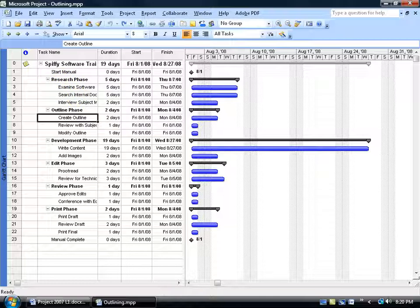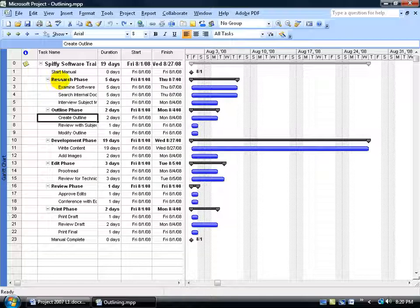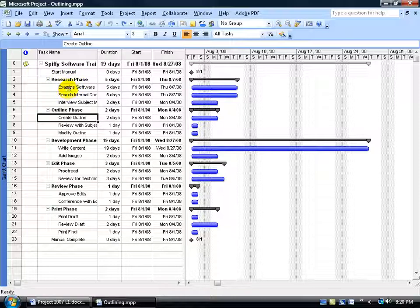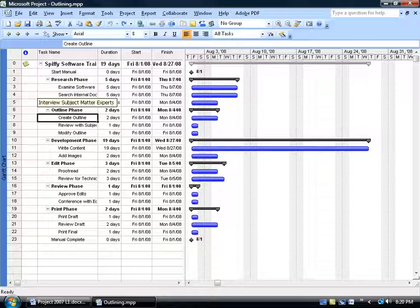But if I apply the WBS, which will be great in reports, what that will do is it'll take a number, like it'll assign the summary task, let's say the number 2, and then a subtask, instead of going sequentially 3, 4, 5, 6, it'll go 2.1, 2.2, 2.3, and so on.